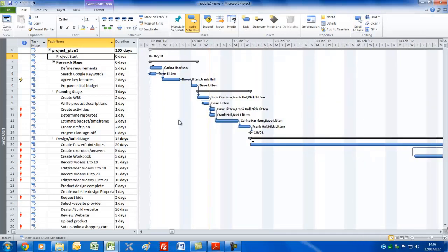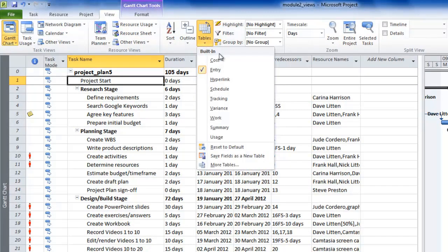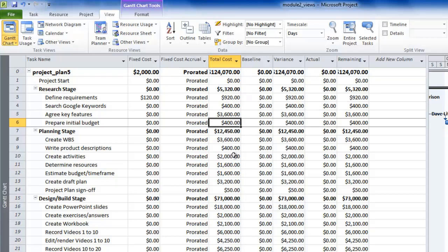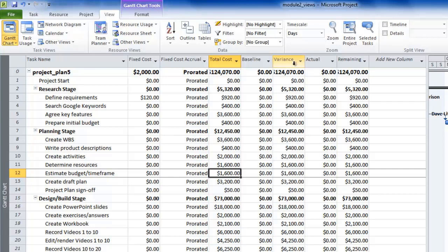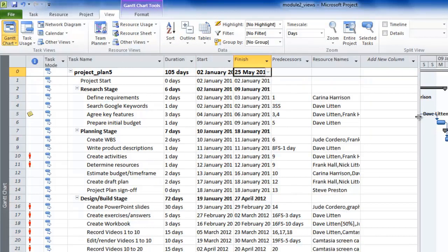I intend to look at tables later on, but this here as I've already said is the entry table. If we go to the view menu and click on tables, you'll see a choice of them - there's entry, for example, and if I click on the cost table, here it is. All this is doing is showing you columnized information relating to each of the tasks. It shows you fixed costs, total cost of each task per row. The baseline - which we haven't saved yet. Variance is variance against the baseline. Actual costs when we start tracking actual costs, and remaining costs. You can add a new column if you choose. Let's go back and put the entry table in.